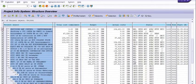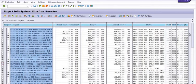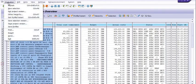You can easily export this data to Excel. Go to Evaluation or go to List — you can export and get the analysis of these WBS. If the WBS work or project work has been completed, send it to the consent team for the closure process. This is a routine activity you need to do at the end of each quarter and at the end of each financial year. The system will not automatically identify if these projects are completed or not. If a WBS is not completed, some CWIP cost or unsettled cost may be pending.